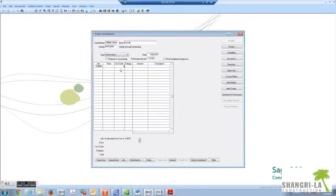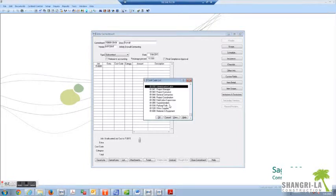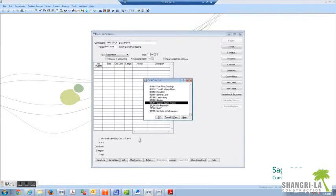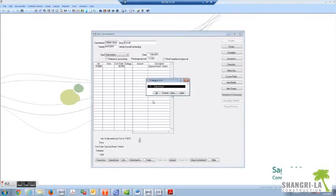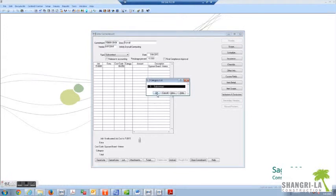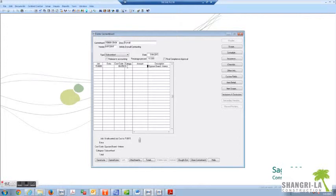Go to cost code, hit F4. Again this is under CSI division 9, so I'm going to select something in the 9 division. Under category, hit F4 again. You should only see subcontract. Again if it's a purchase order you may see something like O for other or M for materials. And if it's not there you can override this and hit O or M.